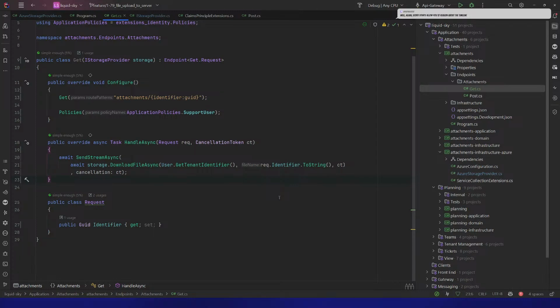At 6 months out, maybe you have 2 or 3 sprints worth of work planned. So you don't know what 6 months out looks like if you're doing 2 week sprints, right? So you can only look at large estimations and say, okay, well, based upon past experience, these epics took this long, etc. We can estimate that these will be done by the end of the quarter. The closer you get to the end of the quarter, the more accurate you get. So at 3 months in, you understand, okay, is it looking like it's on track or no? If it's way off, then you know it's way off by 3 months in.